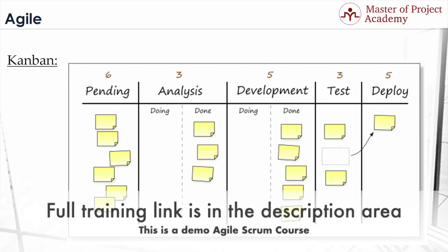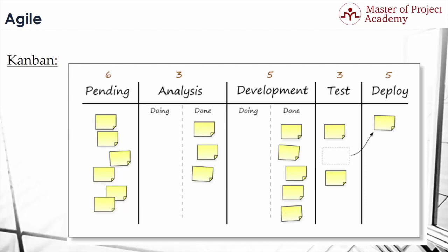The limits are the critical difference between a Kanban board and any other visual storyboard. Limiting the amount of work in progress, abbreviated as WIP, at each step in the process, prevents overproduction and reveals bottlenecks dynamically so that you can address them before they get out of hand.